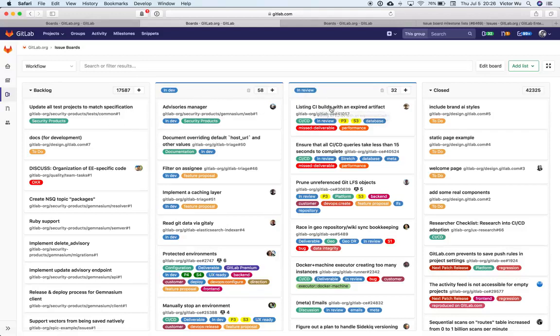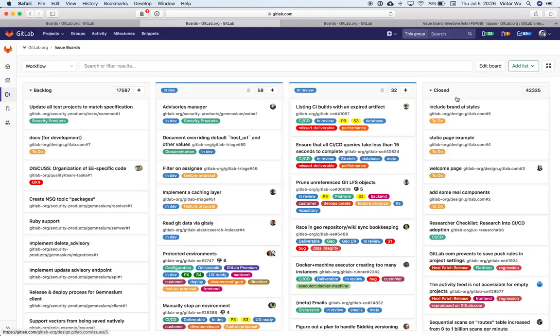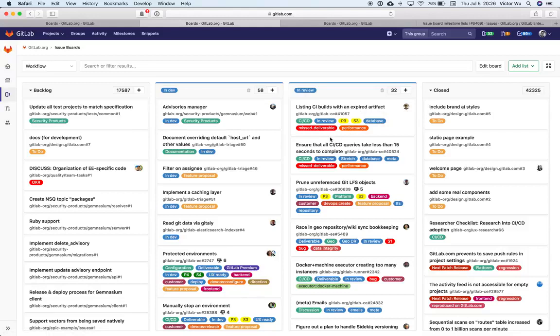And so in GitLab, we only have two stages. But in other organizations using Agile or related methodologies, you might have In Development, Waiting for Development, In QA, In UAT, In Code Review, and so on and so forth, all the way to Deploy to Staging, Deploy to Production. You have five, six multiple stages, and you drag them along the list. So it's a workflow.